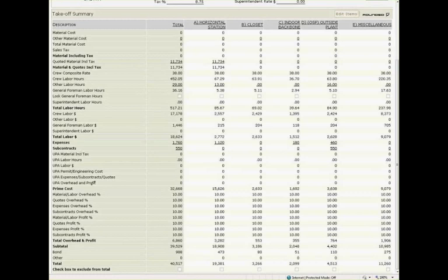Next is prime cost. This is a very important number to understand. Red Rhino totals all costs in the entire estimate and displays that total as the prime cost here. The prime cost in your project is the budget if you win the project. In this example, the prime cost is $32,668. Now, if you went back and added more materials, that prime cost would change, of course.